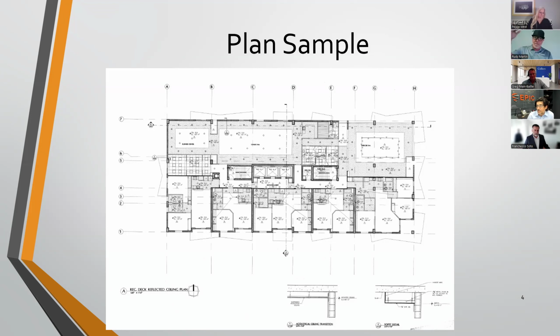Well, somebody's apple might be 50,000 and somebody else's apple might be 25,000. So the general conditions number could be really high, but the line item number could be really low. And now it gets confusing. The bottom numbers make sense, but everyone has a different way to kind of paint this picture, and everyone goes about business differently. I know this from being in restoration a good part of my life, that I've seen other bid forms, and they could be all over the place.